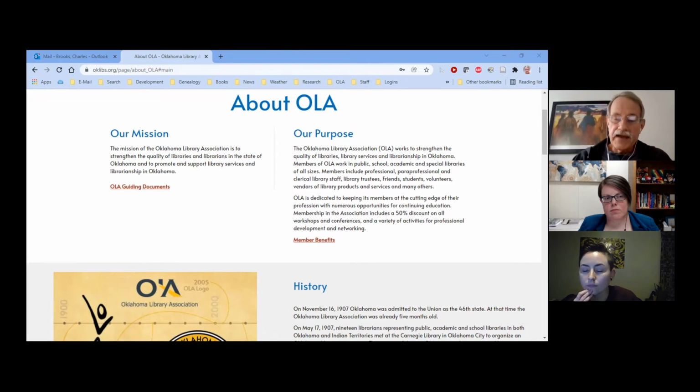And unfortunately, after the 3rd time, we discovered that we needed to have what's called an expand all link. Again, this is for accessibility purposes on some of our pages that were using a particular JavaScript. And when I brought it up to them at YM, unfortunately, this was after our 3rd revision. And so they were going to charge us $125 an hour to make that change. Get your changes in. Get your changes in early. Always be sure you know exactly where you are in the process. Don't lose track of what's going on.